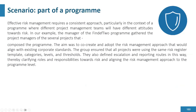Let's look into a small scenario: part of a program. Effective risk management requires a consistent approach, particularly in a program where different project management teams will have different attitudes towards risk. In our example, the manager of the FINDF2 program gathered the project managers of the several projects composing the program. The aim was to co-create and adopt a risk management approach aligned with existing corporate standards. The group ensured all projects used the same risk register template, categories, levels, and thresholds. They also defined escalation and reporting routes, clarifying roles and responsibilities towards risk and aligning the risk management approach to the program level.